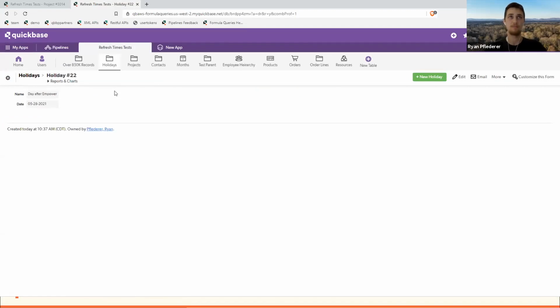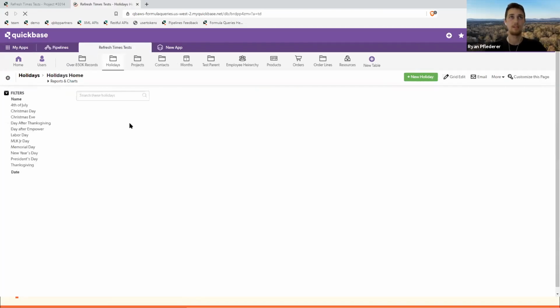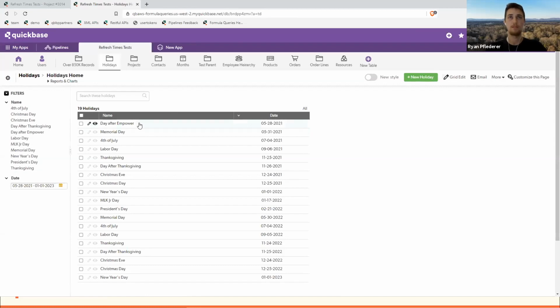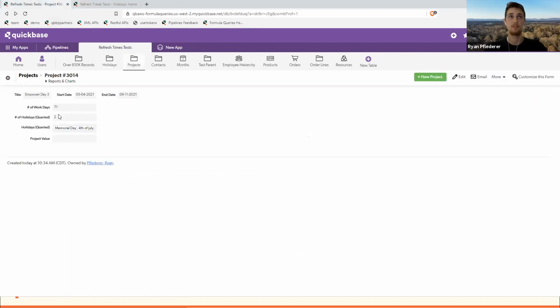We've been doing all kinds of fun stuff. So now in the holidays table, if I can jump back out here, we now see day after Empower, holiday date of 5/28. Jumping back into the project, we should see this number jump to 3, and we should see that day after Empower show up as a holiday name. And look at that. So we've now accounted for a new holiday simply by adding a record into this holidays table.